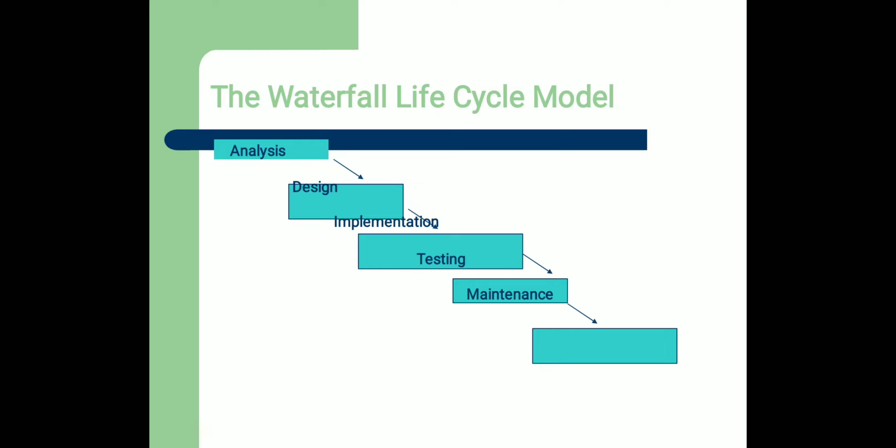After design, you have to see the modifications. Then you go for the plan from the municipal office. After the plan is received, only then do you go for the implementation, that is, the construction of your house.